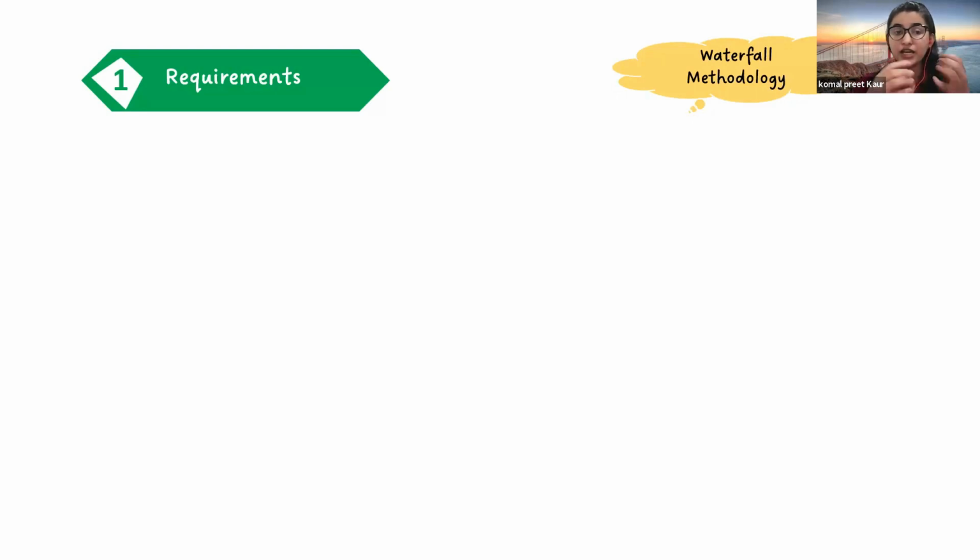So for example, if the overall time we are considering is 6 to 7 months, then 25 to 30% of the time will be given to the requirement phase only. Approximately, it will be around 2 months. We are just collecting the requirements only. So that is about requirements.